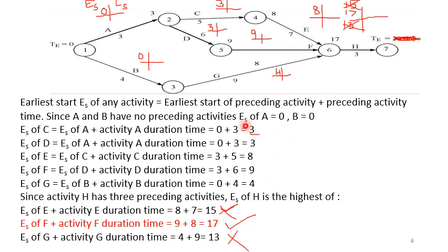Activity F has another 4 days to complete because it will be complete only by the end of the 17th day. So what are you going to do here? You wait. Activity G will wait. Similarly, next E will be complete by the 15th day. Then can H start? No, because only G and E are complete. F is yet to finish. So H can only start when all of G, E, F are complete.